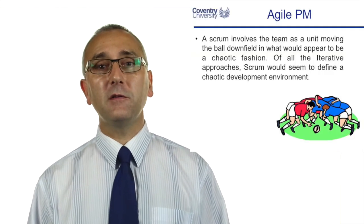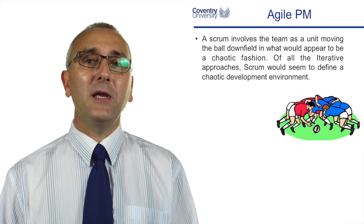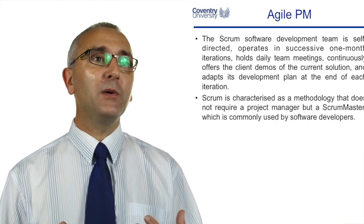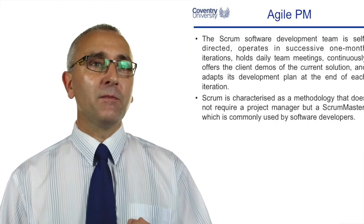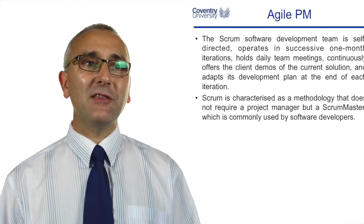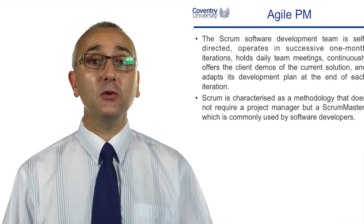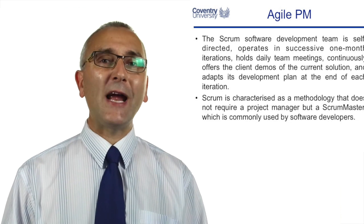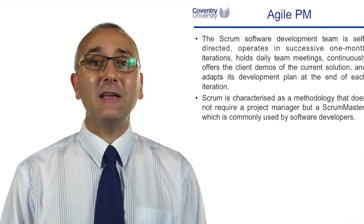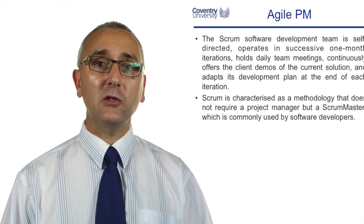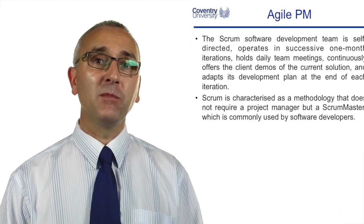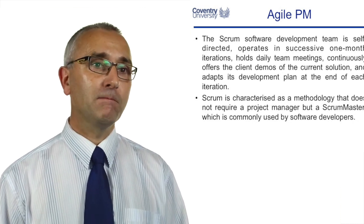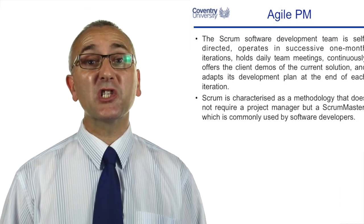We might hold daily meetings called a scrum. Those familiar with rugby might think a scrum is a chaotic maul where everybody piles in, but a scrum really means the team working together in daily meetings where they shout out issues and set priorities for the coming day. It's a typical round-the-boss's-desk meeting at 8:15 every morning — what are our priorities for the day, and what do we need to have ready for the Friday customer showcase? Sometimes these scrums are chaired by somebody called a scrum master.